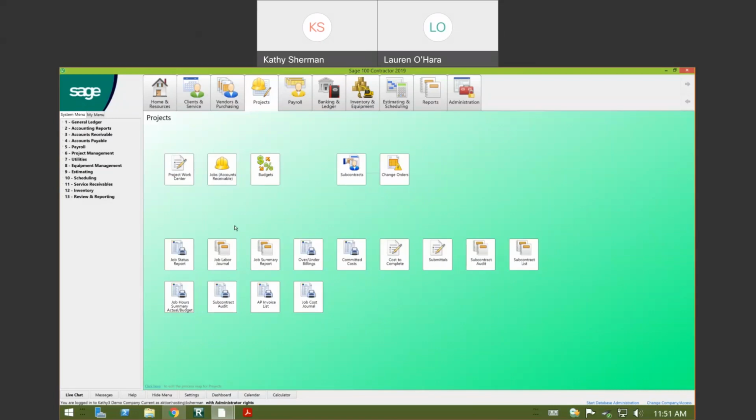The labor is going to update, well, I'm going to back up a second and say it's going to depend on what report you're running. I would say a majority of the reports update when payroll is run, but there are some reports that update prior to that, where you saw accrued payroll. So accrued payroll in that one committed cost report meant payroll hadn't been run yet. So hours had been entered, but it hadn't been run yet.